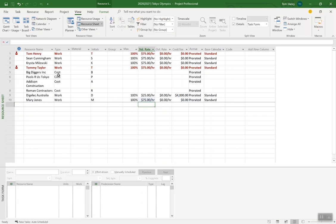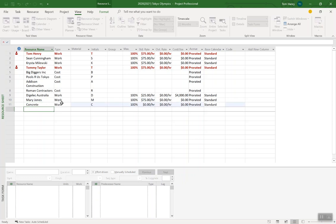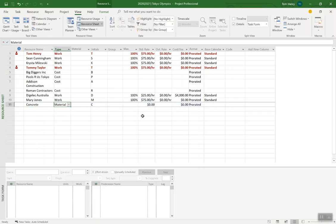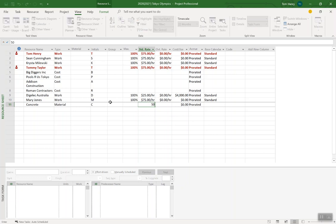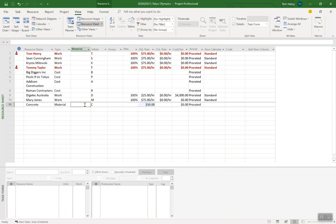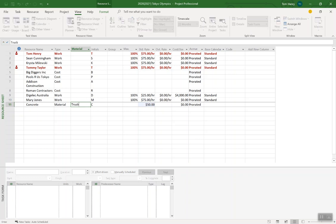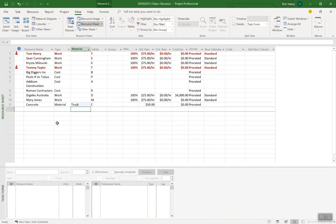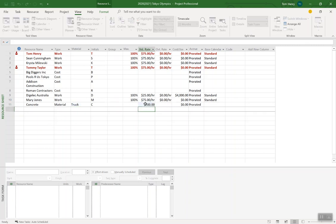Once you've got that you want to have a good variation of work resources, cost resources and maybe some material resources. I'm going to need some concrete on my project. Material label here and you'll notice that I can specify how much I charge. I'm going to say I will charge $50 per let's say truck. A truck of concrete right. Fill that up. In fact that's a bit generous. Make it 500. So every time you have a truck it cost us $500.